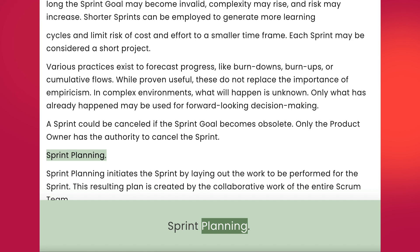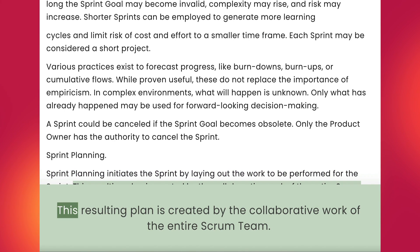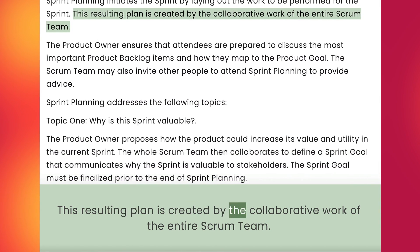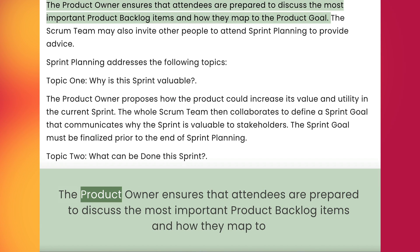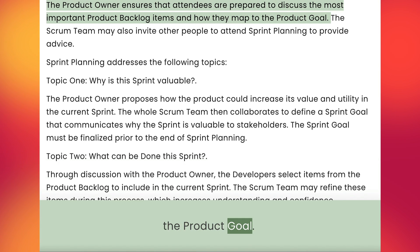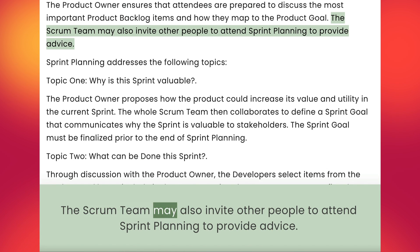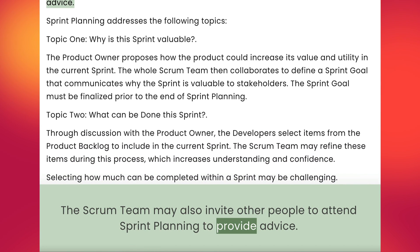Sprint Planning. Sprint planning initiates the sprint by laying out the work to be performed for the sprint. This resulting plan is created by the collaborative work of the entire Scrum team. The product owner ensures that attendees are prepared to discuss the most important product backlog items and how they map to the product goal. The Scrum team may also invite other people to attend sprint planning to provide advice.